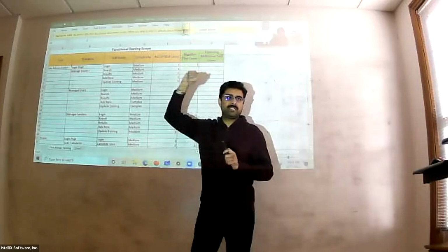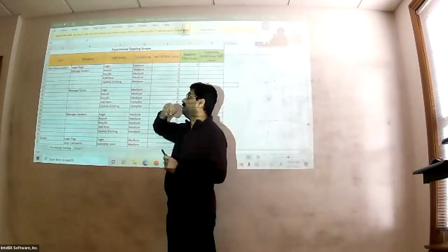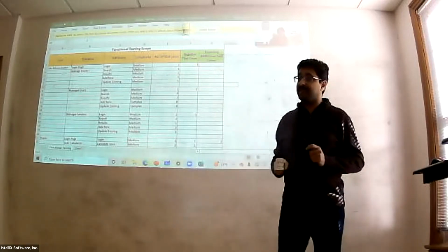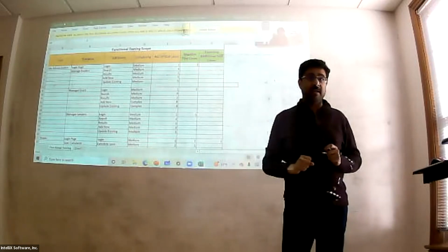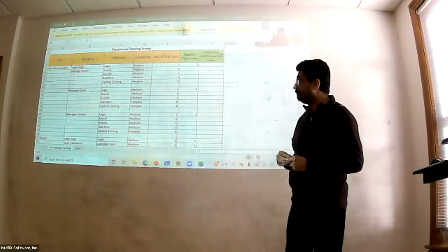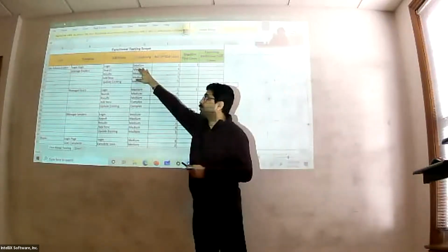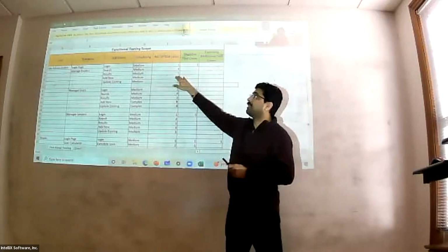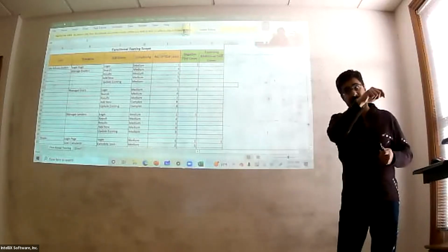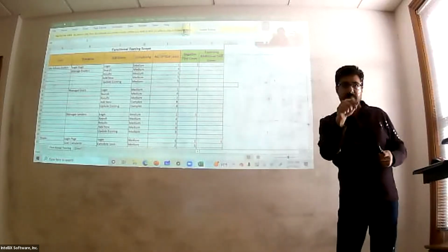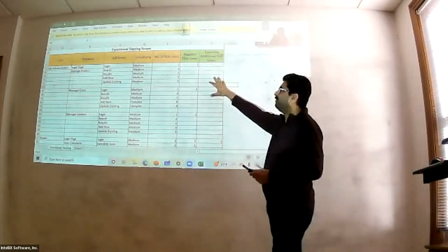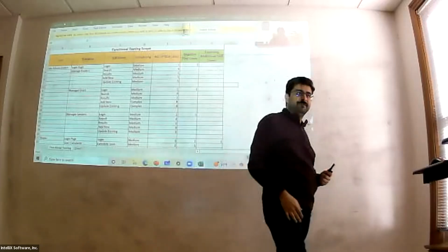Then managing a dealer. Well, that is a little bit more complex than the login. I can break it down: there's search for dealer functionality, so I need to test that. I need to test adding a new dealer. I may have to test adding or updating a new dealer or existing dealer. I may have to go through a whole bunch of that. How many test cases do I need? A rough guesstimate, because I understand the requirements. So I can say I need to test this requirement separately, or I can combine these two requirements into one test case. So you come up with a rough estimate of how many test cases you need.